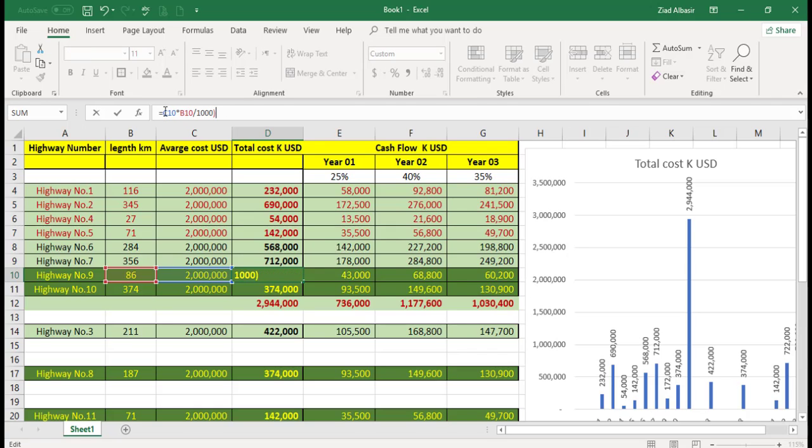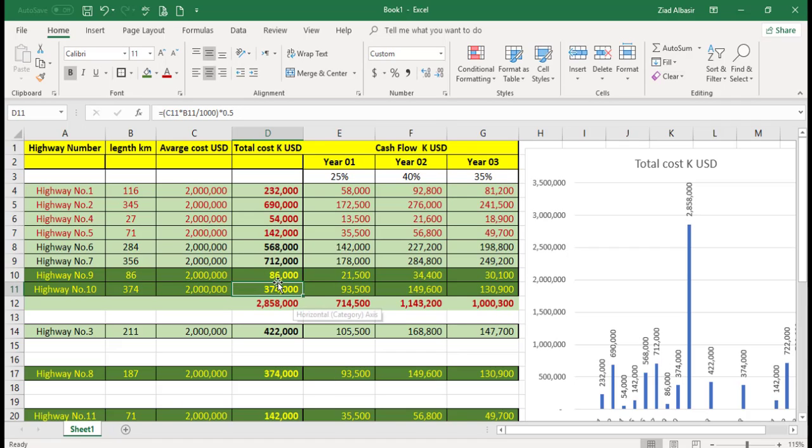So rather than doing it in 3 years, we'll do it in 6 years, unless we have funds to complete it fully. Okay, in this case, we have less than 3 billion, and every year it's approximately 1 billion. So the remaining budget from the first year can be transferred to the second year to cover the second year, and then the third year is sufficient by itself.